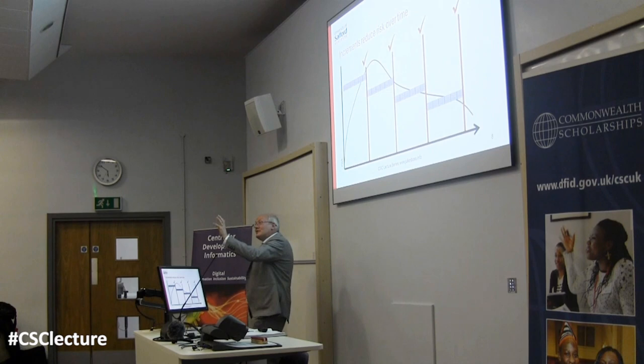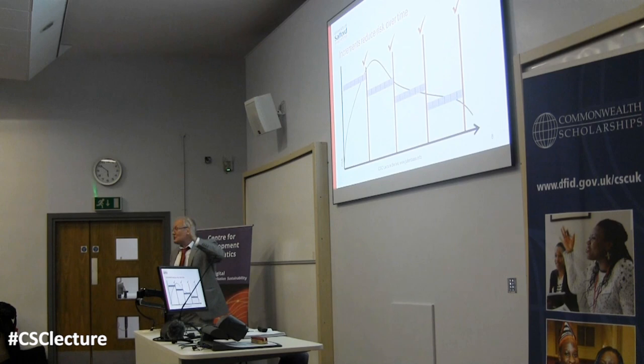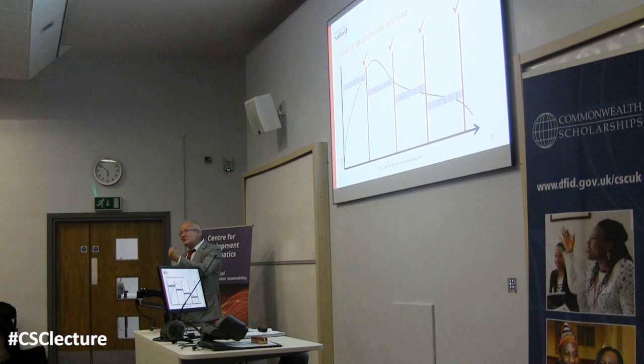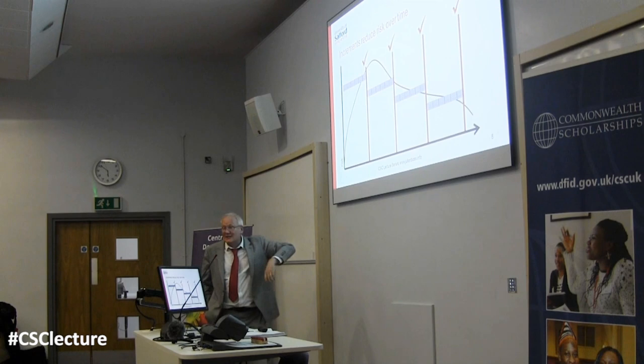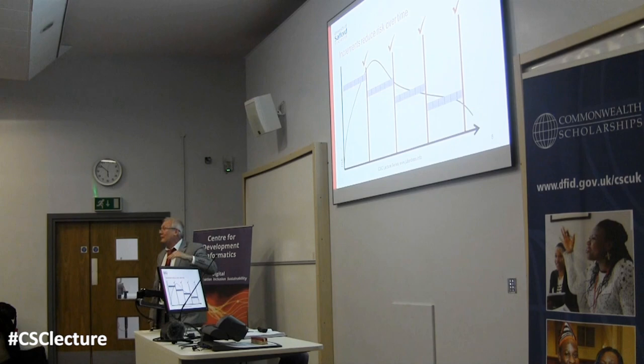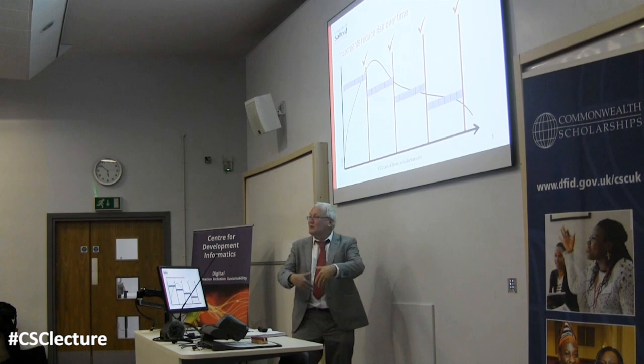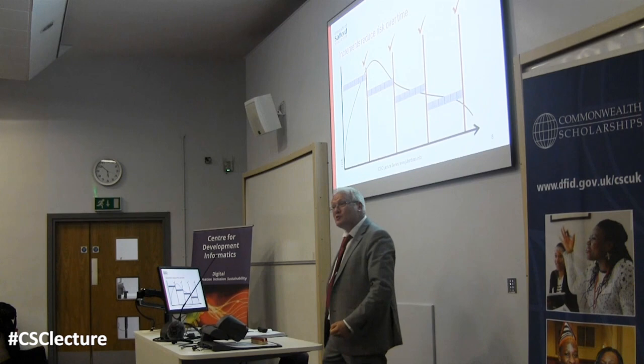So the idea of these increments is that you do some requirements, do some design, build something, test it, give it to a customer and get some feedback, and then you can move on to implement other fragments of the system. And there's a curve here: instead of the risk getting bigger and bigger as the project goes on, the risk is getting less and less, because the things you're building are more and more trivial compared with what you've already built. So there's a progressive sense of warmth and positivity that you get on these kinds of projects when they're going well.